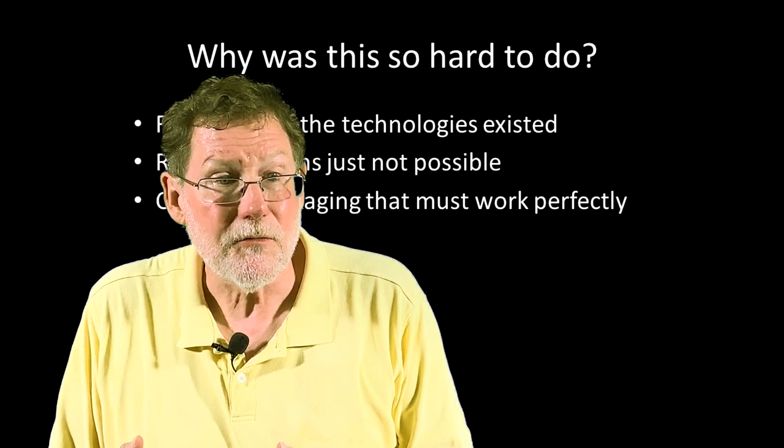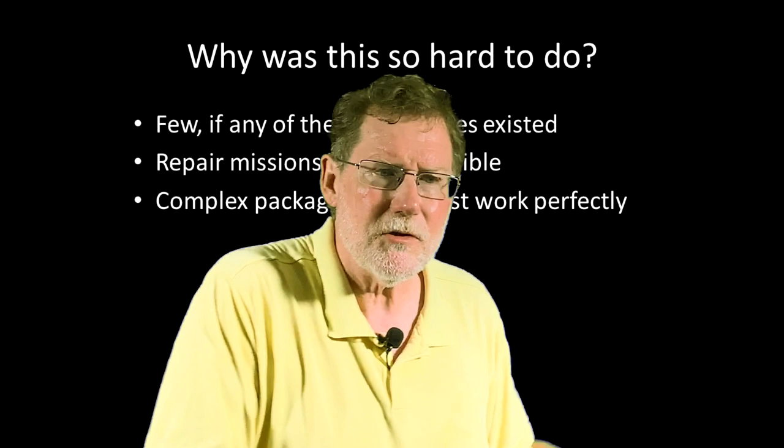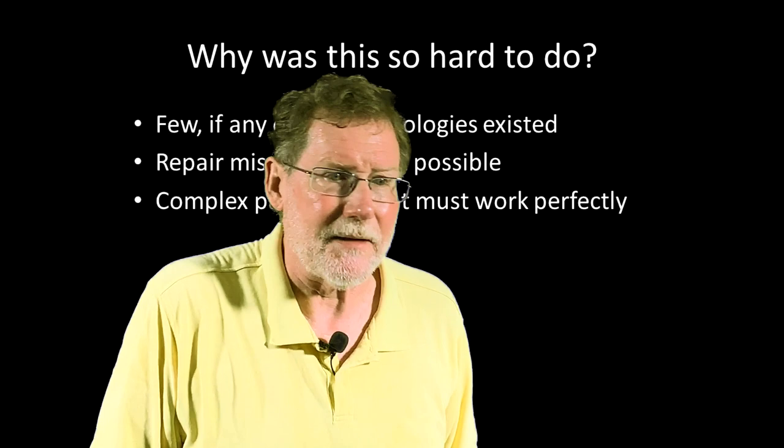Now, scientists, ever optimistic, submitted a plan that seemed reasonable. Oh, yes, it required a few new technologies for the mirrors and cooling and the instruments, but these were considered doable and acceptable risks. The reality turned out to be far more challenging than anyone expected, and years of scheduled delays and billions of dollars were added to the project.